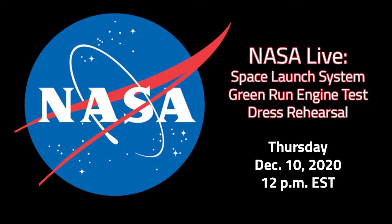As part of the procedure that we have laid out for wet dress, we have a 2-hour hold in the procedure, but it all happens within the same day. Right now we start about 6 a.m. in the morning, getting the team ready, and then around 4 or 5 p.m. in the afternoon is when we're looking towards the end of the hold period itself. So it's a pretty long day, but we do have a 2-hour hold in there, and that's really just to help us understand for launch operations how long we can hold, and that the system can accommodate that requirement.